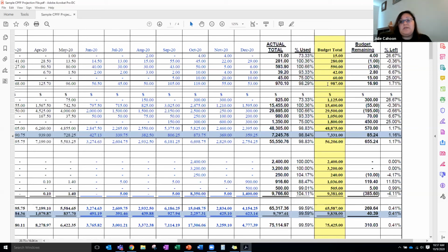So this is what you submitted to your funder, and you said, we're going to need this many hours to do this project overall. And so then you break that number out across the staff that you indicated would be assisting with it. And then this here just shows you the total, what you have remaining based on what the projected work is to be. And this is in hours. And so here you have that transferred and related to you in dollar amounts.